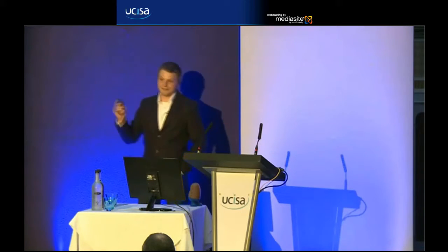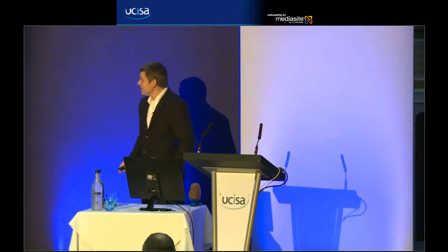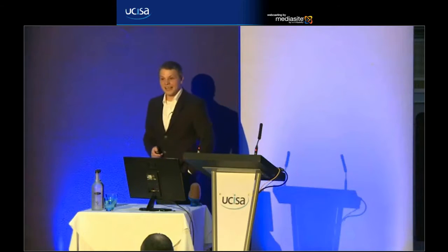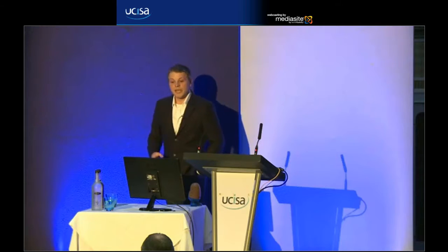So we can have that discussion, and they go, but you've not thought of this. And you go, you're right. We all need to have another vote on this and revise our estimate. So we go through the Agile Stories, the whole lot of them, and at the end of that, what we have is an estimated relative size for each story.